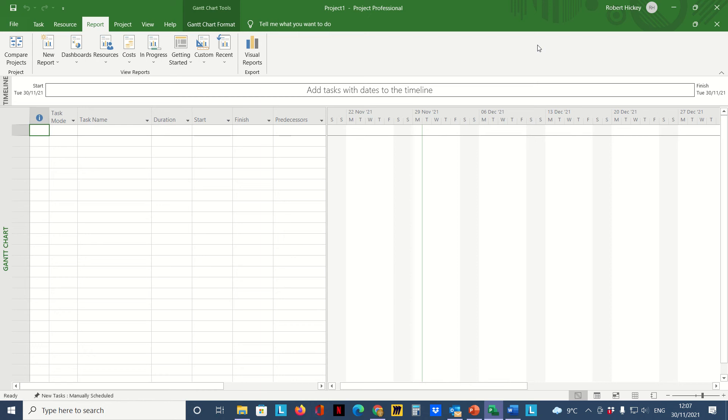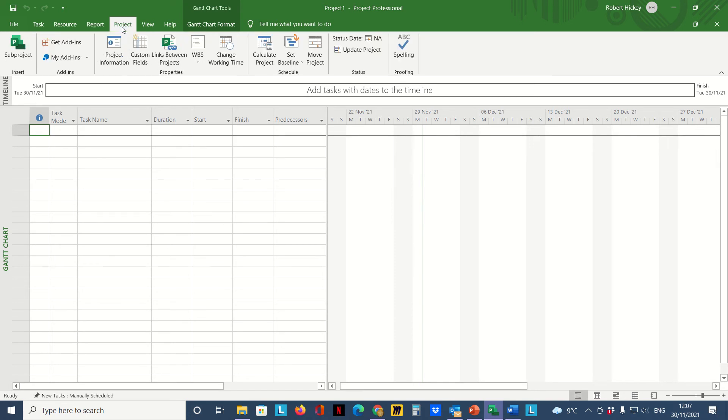Hi, this is a short video giving you an overview of some of the basics in Microsoft Project. The very first thing we do when we open up a project file is set the project start date, so we go to the Project tab and in the Properties group we click on Project Information.